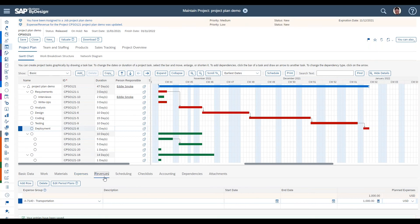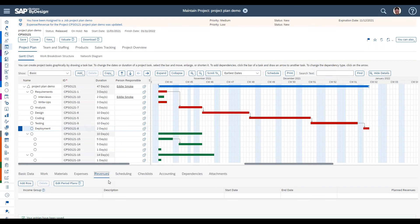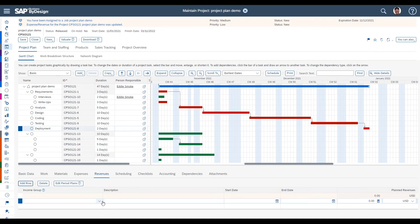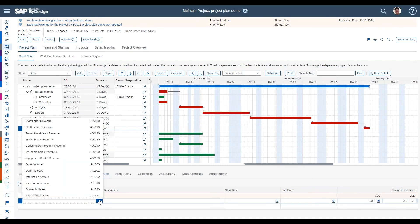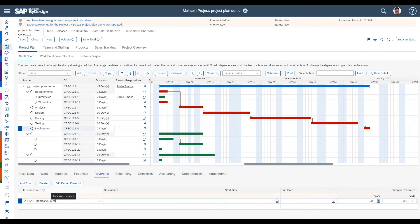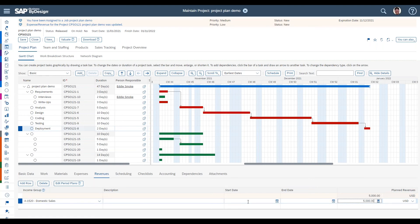Similar to expenses, there's also an option to plan expected revenues. You can do this at any level of the project — the project header, summary tasks, or specific tasks. It works the same way: add rows and select from the income groups defined in the system. For example, on the deployment activity we might expect revenues of around $5,000. Leaving the date range blank spreads the amount over the project duration, or you can refine it using specific start and end dates or multiple rows with different income group types.